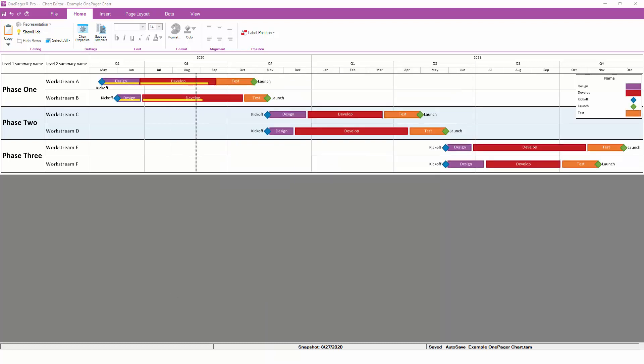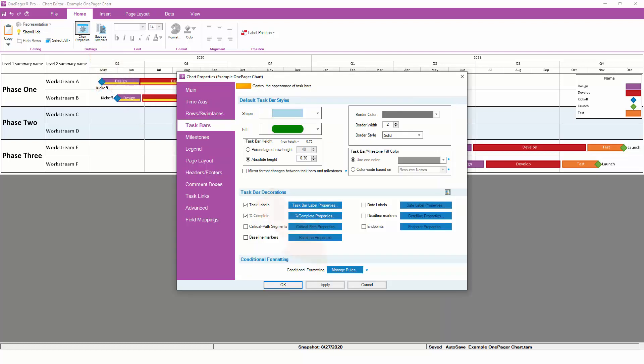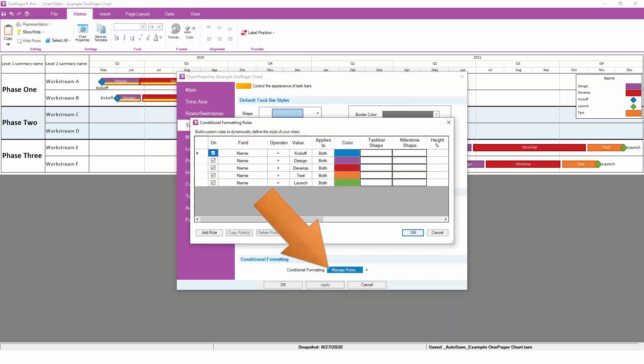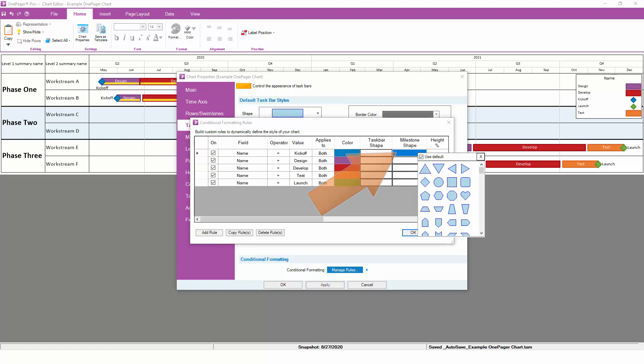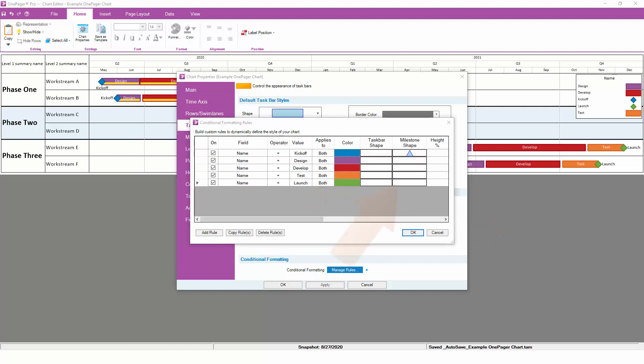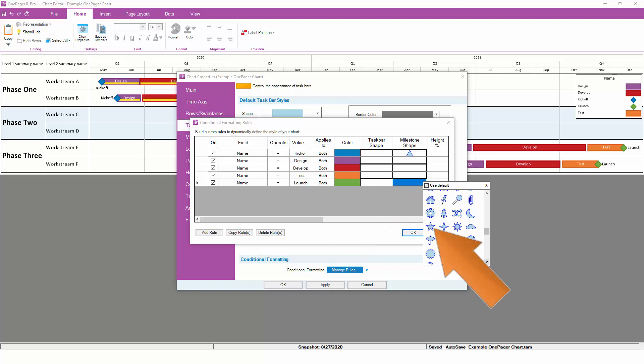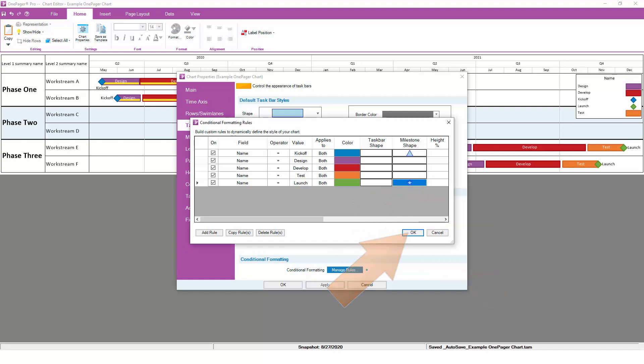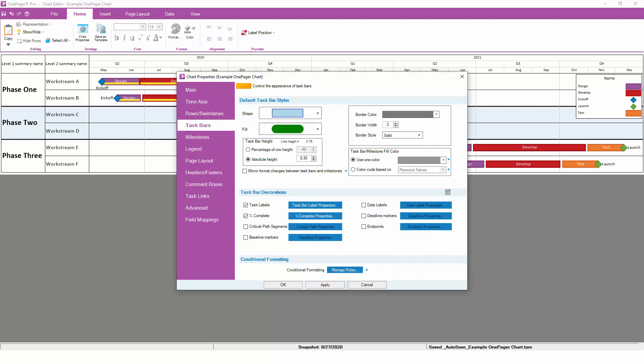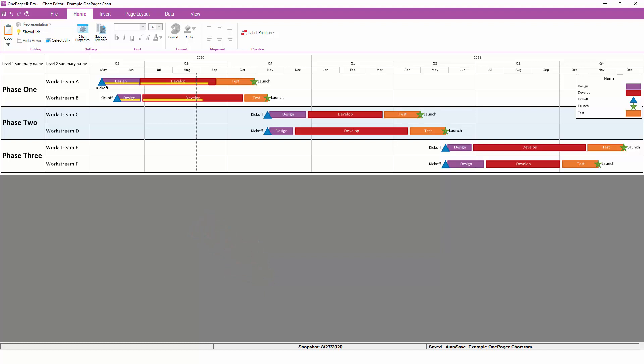Conditional formatting is not limited to only color. It can also be used to assign shapes instead, which is especially useful for milestones. Currently, all of the milestones in our chart are diamond shapes, but we can assign different shapes to different types of milestones conditionally. Let's modify the existing rules for our milestones to not only assign a color but also assign a shape. The kickoff milestone can be a triangle and the launch milestone can be a star. Once these rules are applied, we immediately see the shapes change in the chart without any need for manual editing.